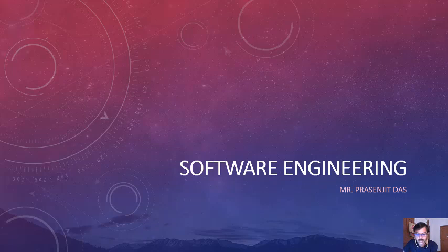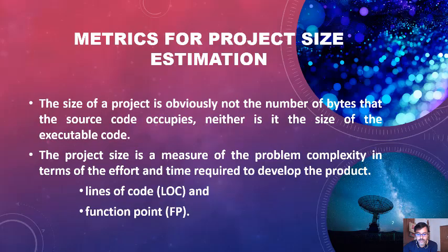Project cost estimation and project scheduling are normally carried out together, and the cost of development is primarily the cost of the effort involved in the project. It includes not only the cost of the employees, but also the hardware cost, effort cost, travel cost, and other costs like rent of a house, electricity cost, etc. Hardware and software costs and their maintenance, travel and training costs, and effort cost cumulatively make up the whole cost of the software.